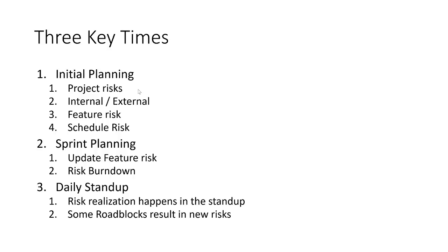In construction, they have stand-ups every day as well, and that is, again, a risk mitigation thing. They want to be able to say, hey, I'm going to be swinging a girder through the 2nd floor in section 2 today. Anybody going to be there? Oh, yeah, I planned on being there. Well, you might want to put your head down at about 1:35 today, because we'll be swinging a girder through and I don't want to take your head off. Right there, it's a life safety thing. It's easy to find yourself not paying attention to that in a software project or a services project where you're not seeing life or death situations. So these are important times.